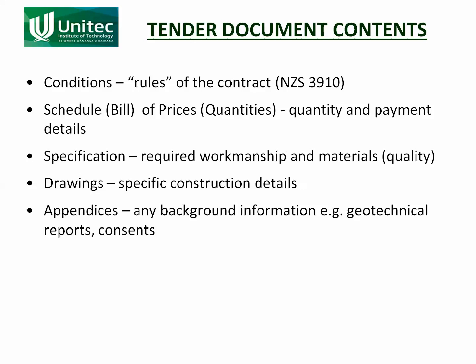So it is required that you put as much information into the contract as possible. If the consultant knows something about the ground and he doesn't reveal it in the contract, then the contractor can actually ask for extra payment because of that. So the appendices are quite important.